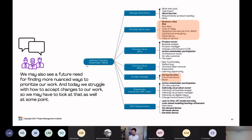This brings up a point about the goal diagram notation. When something is bolded and italicized, it means it's a really good starting point — not knowing anything about your context, it's a good default. An arrow pointing up means that generally speaking, what's at the top is more favorable in terms of increasing team agility than what's at the bottom. So accepting changes during iterations is generally more favorable for increasing agility than accepting changes in future iterations.